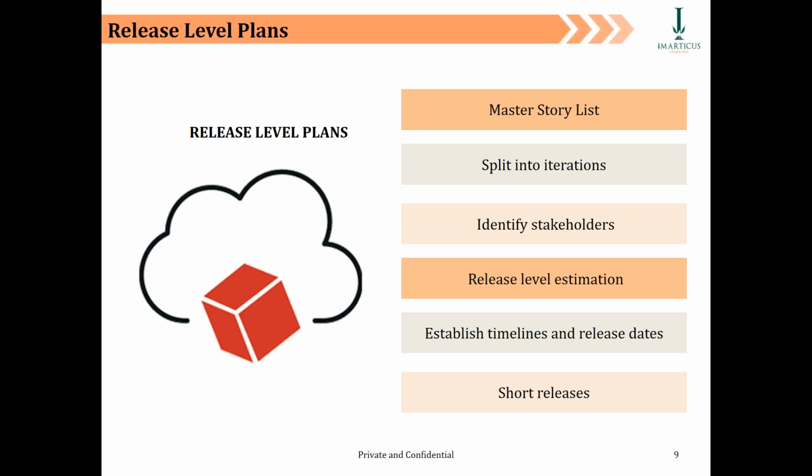So the total number of releases in this project is 10. Each sprint has one release. So over the next 10 sprints, I will have one release cycle each in order to release the code into the system. And for that, what are the stakeholders that I must know of?